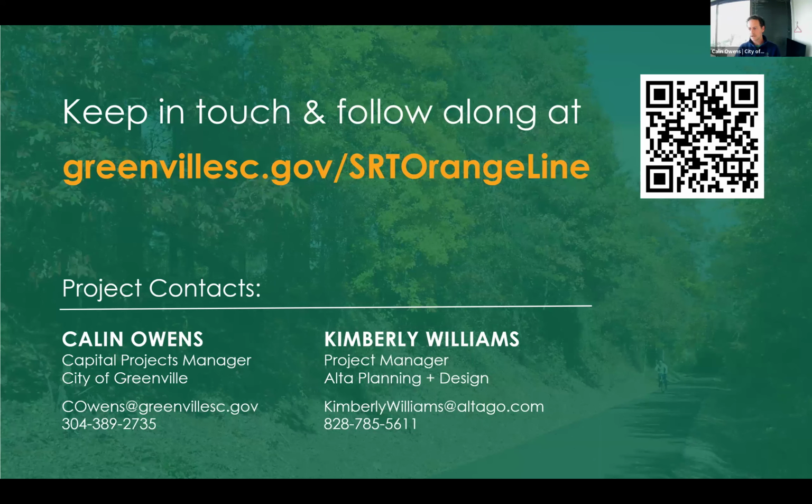Gene, just to jump in for a sec, the 5 years, just to clarify, is for the rail portion. The intent with this project would be that we're moving forward regardless of the rail portion. But we're being told by the county that that piece of the trail is about 5 years out. And so we anticipate, as long as this project stays on schedule, that we'll be prepared to probably bid for construction in 18 to 24 months from today. Thanks, Galen.